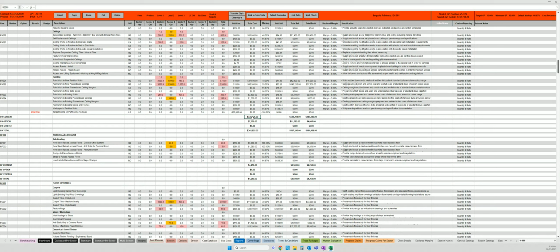So I might look at this package, I might have spoken to a trade, I might know I've got some fat in this package, or I might just set myself an internal target to go, I need to bring profitability up. What's the target I'm going to set? And in this instance, I'm going to set a target of a saving of $50,000 on the partition package. So I'm going to activate that by putting one in. So I save $50,000 and I don't change revenue.